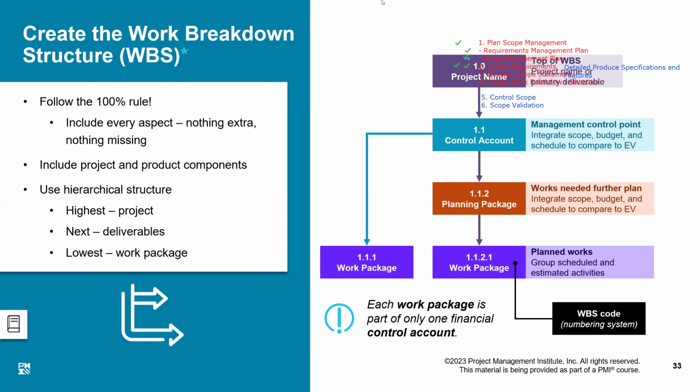Mind it, I do not mean that work packages cannot be further broken down, but I am specifically saying that the work package is the smallest unit in the WBS, because the project manager is not interested in deeper knowledge. He would have to take his progress reports out of the work packages, and therefore the work package is the smallest unit of the WBS. But again, I will repeat, work packages will later be further broken down into activities, but not here.